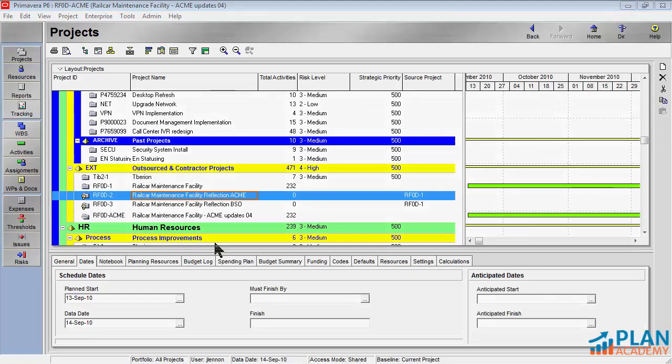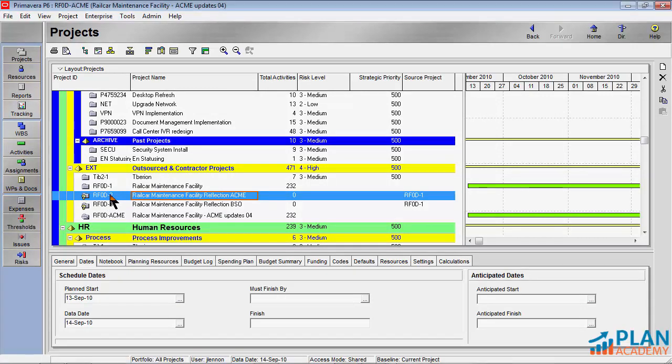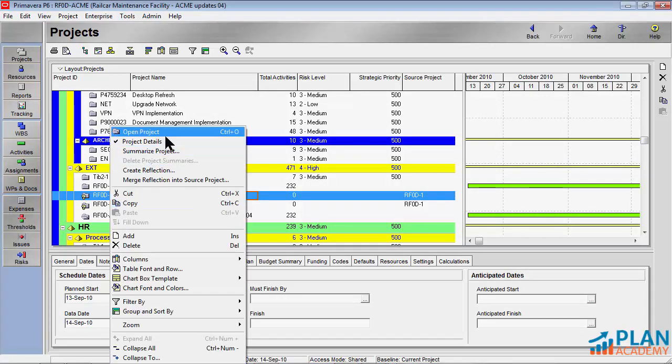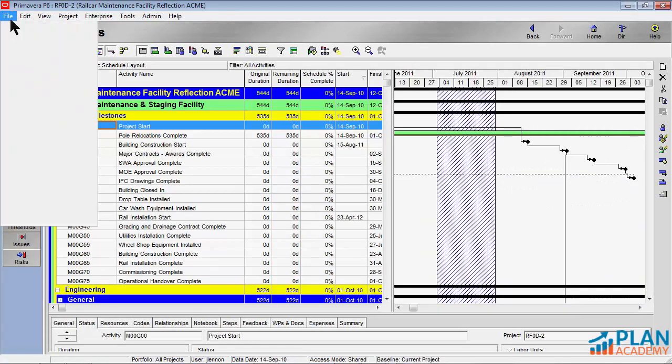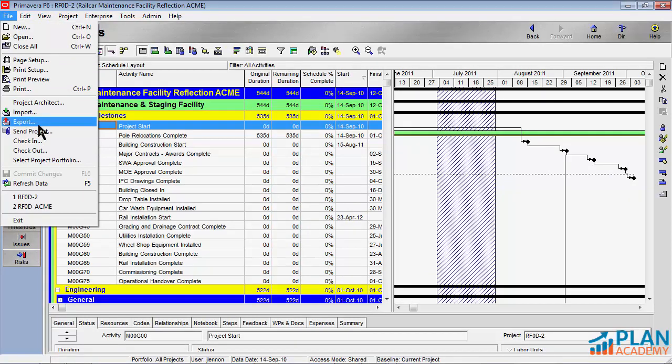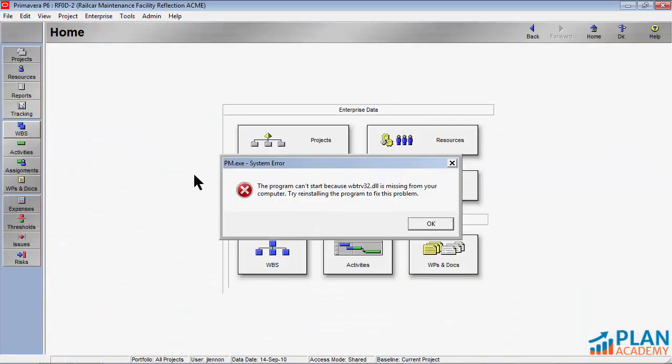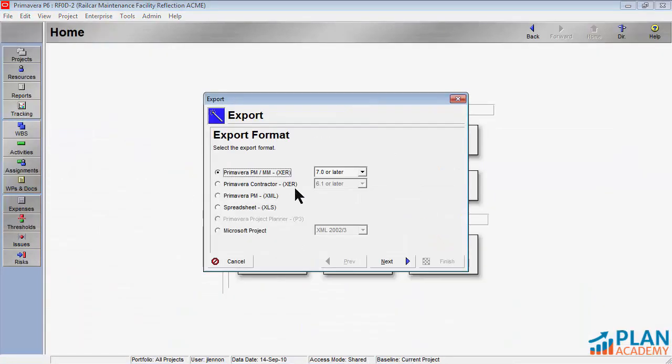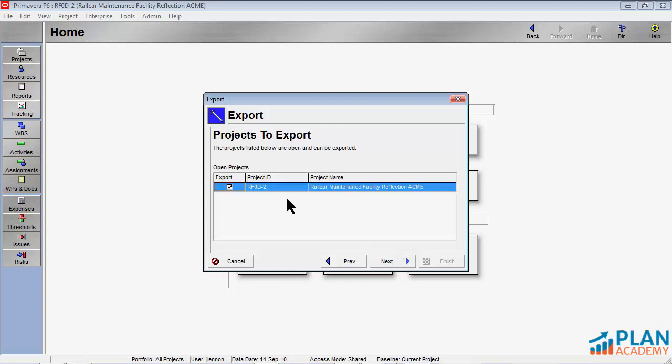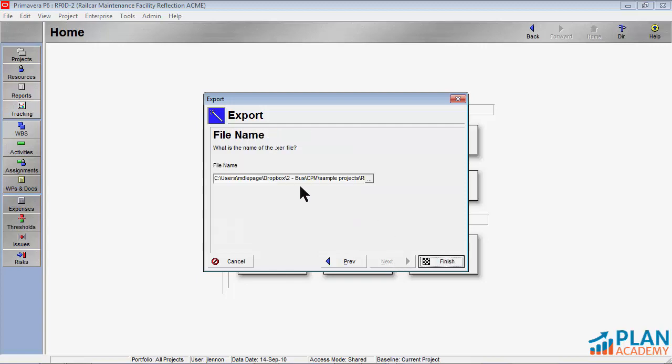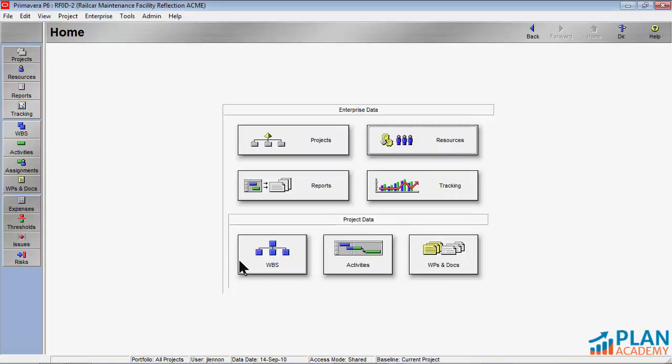So now that I've created these two reflection projects, the process I would follow would be to open one, open each of them one at a time, and then essentially to export them to an XCR file. You can ignore that error. So I'll export them to an XCR file, and then I will send them off to the contractors in question. Those contractors will update them and send them back. And let's see what that looks like now.